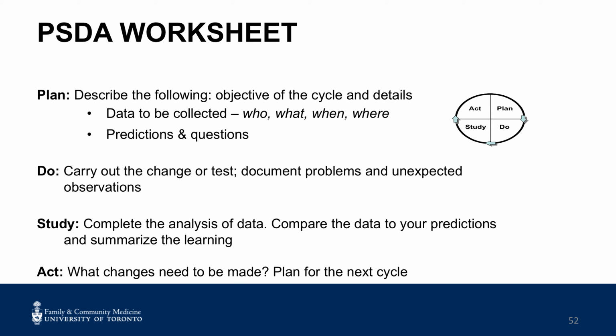So, what are the options with a completed PDSA cycle? If the test showed some promise with manageable problems, modify the test accordingly. If you believe any problems arising during your test were situational, test under additional or different conditions. If it was a resounding success, implement the test.